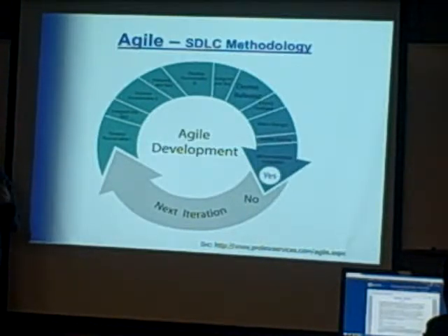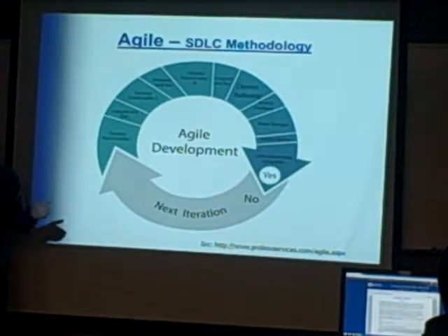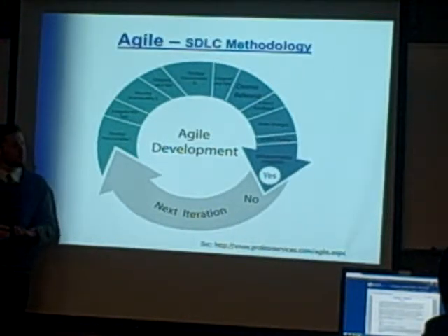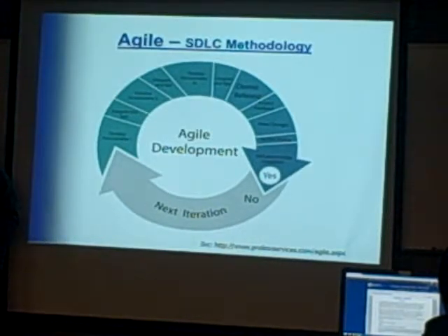Go through the whole process, figure out what you're supposed to build. The idea here is that if you spend 4 weeks creating an iteration, a working version of the software, you put it in front of the clients after 4 weeks, and they can give you a course correction for whatever needs to happen. Contrast that with the Department of Defense, where those projects might be 5 years down the line.